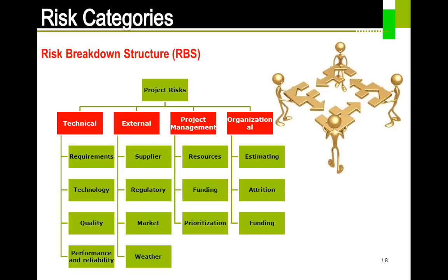To give an example, when it comes to technical risks, requirements, when I say requirements, not necessarily business requirements, the technical requirements. Somebody says that the web page has to come within 1 second. And then we can always say that there is a probability that if the number of users is more than 500, the website will take more than 1 second. So that is the risk. I'm not going to go through all the things, but this is going to give you one very high level view on how risk management can happen.